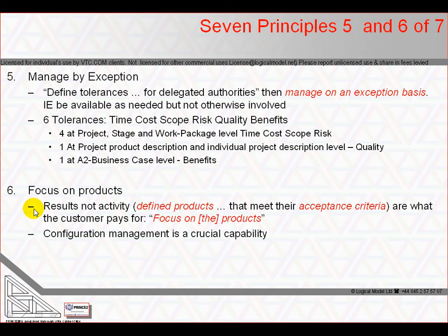An approach based on defined products with agreed quality criteria avoids acceptance disputes, avoids rework, avoids uncontrolled change, known as scope creep, and avoids user dissatisfaction, and aids correct estimation of the effort required from all parties for the acceptance activities. The set of products to be produced is agreed before activity to create them starts. The project's products define the project's scope and dictate the activities to be scheduled and budgeted, tracked and reported.